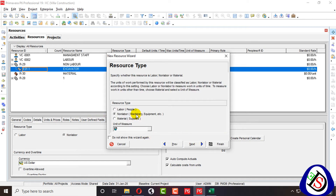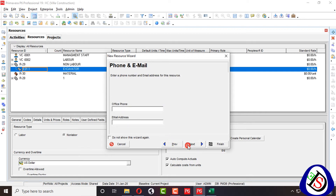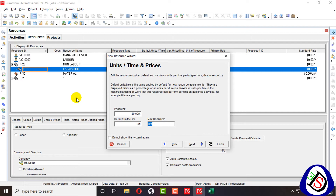Next, price per unit — if you know it, enter it. Default is eight hours per day. It works eight hours. If you have four machines, then maximum units would be 8 × 4 = 32. If you have five machines, it's 40. You can type maximum units per time or per day — it's your choice.